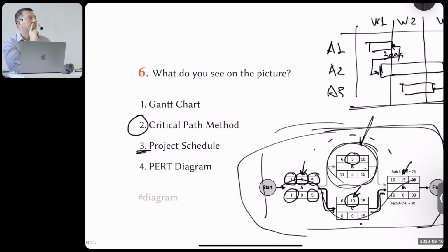And we call it schedule baseline. That's a term from project management. Schedule baseline is something which we draw and sign off. And everybody says, yes, we commit to this, we're gonna work like that. It doesn't mean that it's gonna stay on the wall till the end of the project. It's gonna stay maybe 1 week. We remove it and we create a new schedule baseline. But this baseline means something which we fixed. It's a baseline which we don't move. So we agree that this is how things will happen. But we can change it.